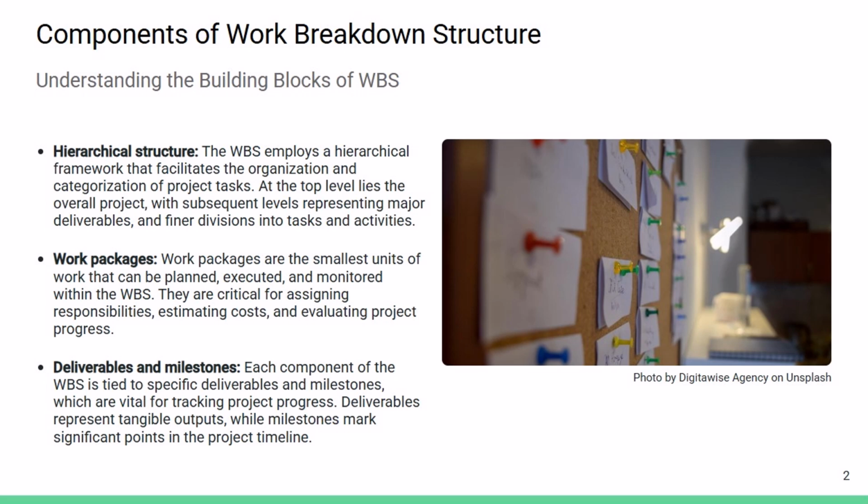Now we will be dividing this work into work packages. What are these work packages? These work packages are the smallest unit of work that can be planned, executed and monitored within the WBS. They are very critical in assigning responsibilities, estimating cost, and evaluating how much of the project we have completed and how much task is left.